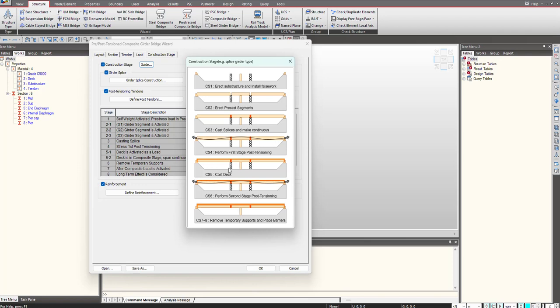For all the components, if I want to perform the post-tensioning, this can only be done once my casting is done for the splice and this is made as a continuous girder. Once this is done, we can cast the deck and a second stage of post-tensioning can be done after the casting of the deck. And then we remove the temporary supports at the splice location. You can see the form work demonstration which will act as a temporary support for the splice location. That is how the process of splice construction is done.